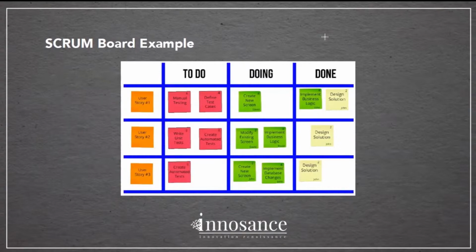So let's say we have 120 items in a product backlog, right? 120 items that we want to develop. We want to deliver by the end of the product development lifecycle, and we divided these 120 items onto sprints, right? Let's say we have 6 months of product development time, and that's what we are going to commit to. And in the 6 months, we are going to start with only sprint 1, which is going to take not longer than 4 weeks.